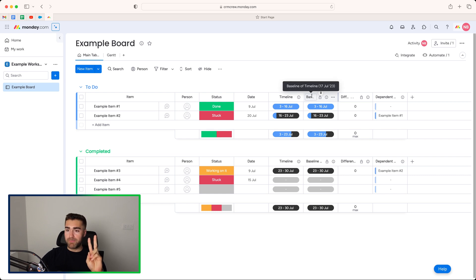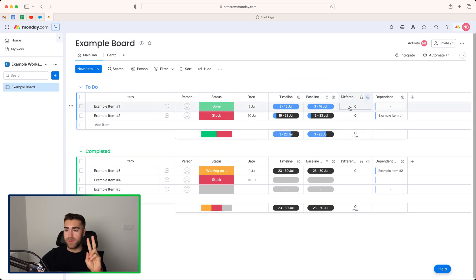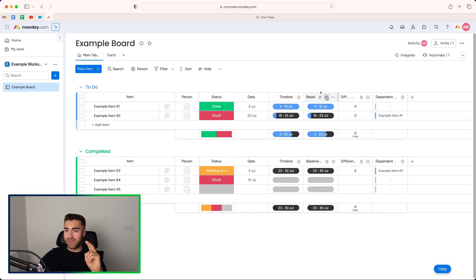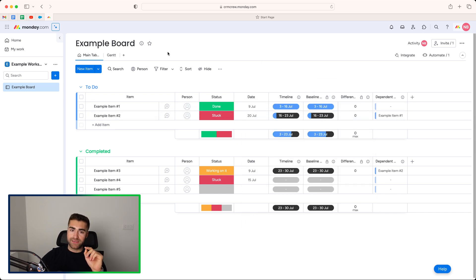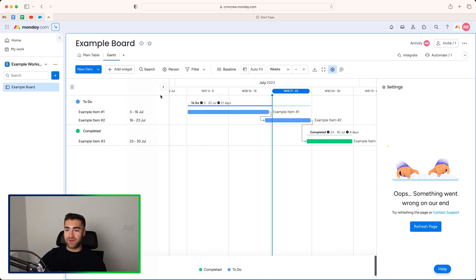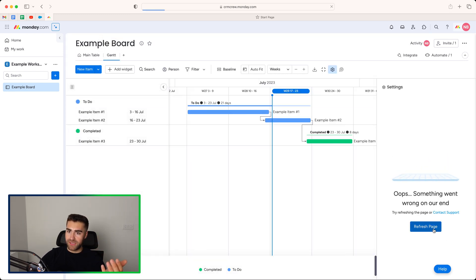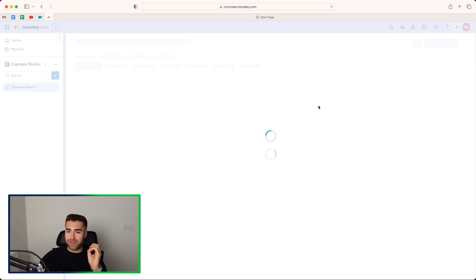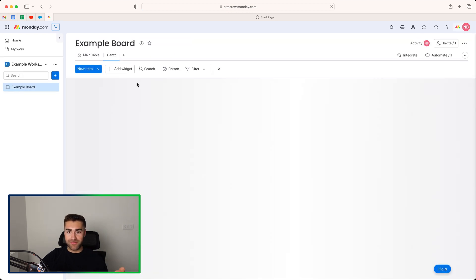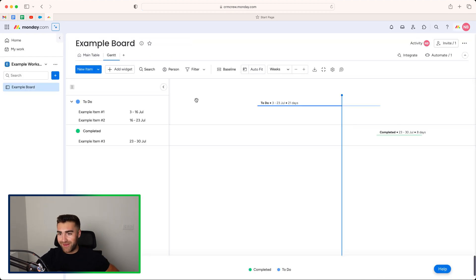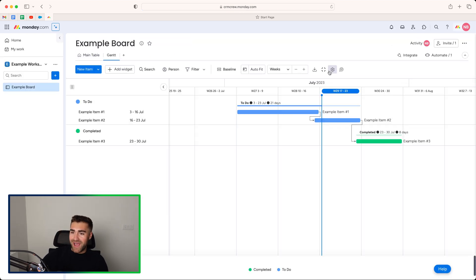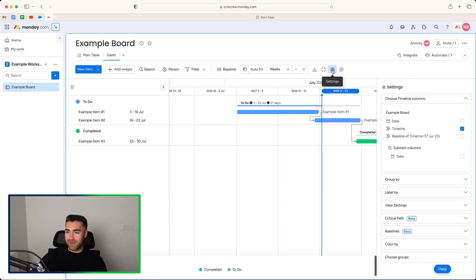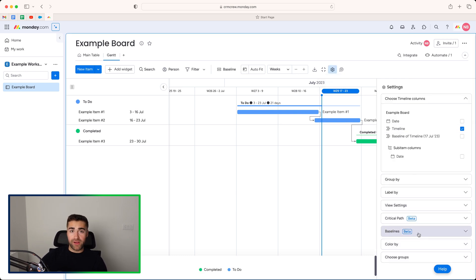If we just head back to the main table, you can see that there's two new columns that have been created. A baseline that is locked and a difference, which is a formula column. And this just calculates the baseline, the difference between the two, and it will then dictate on the Gantt view whether it's going to be red or green. If I just refresh this page, for whatever reason, the dependency column has glitched out, monday.com. But if I go ahead and go back to settings, that's now the baseline. Very, very helpful.